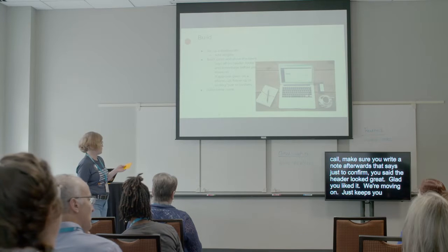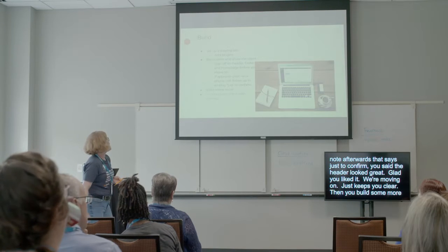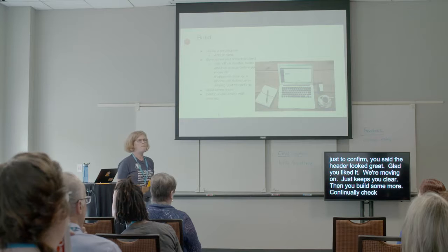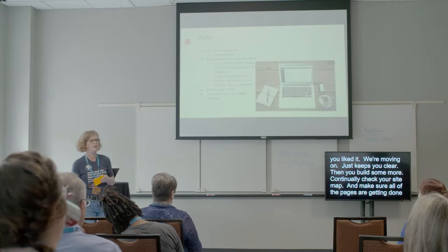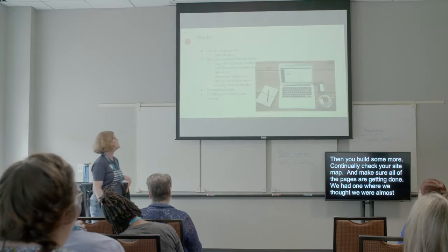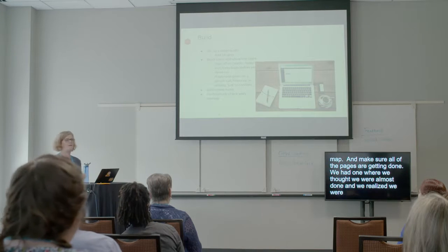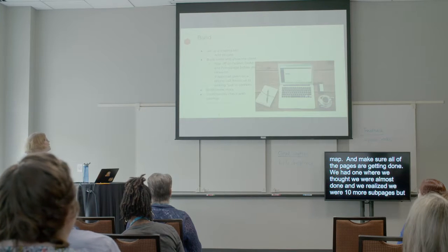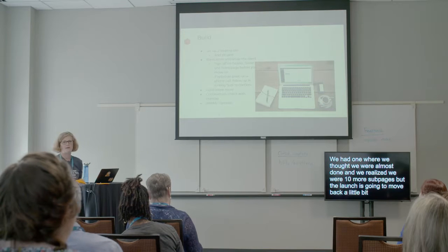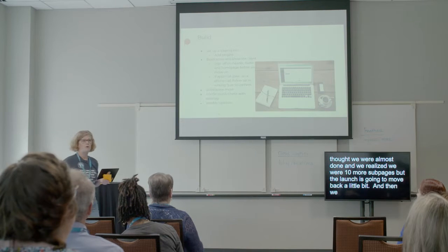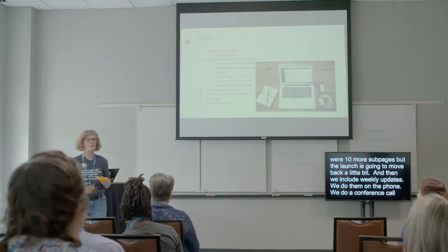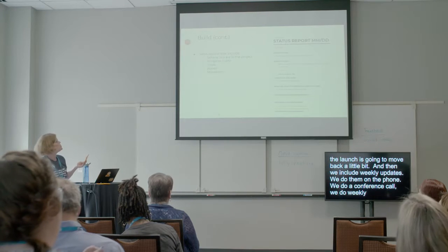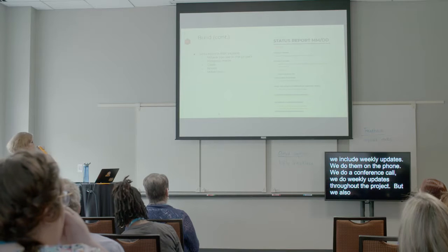If you get approval on the phone call, make sure you write a note afterwards that says, just to confirm, you said the header looked great. Glad you liked it. We're moving on. It just keeps it clear. Then you build some more. Continually check your site map and make sure all of the pages are getting done. We had one where we thought we were almost done and we realized there were ten more sub-sub pages. Like, oops, no, the launch is going to move back a little bit. And then we get weekly updates. We do them on the phone. We do a conference call. We'll show things. We do weekly updates throughout the project.